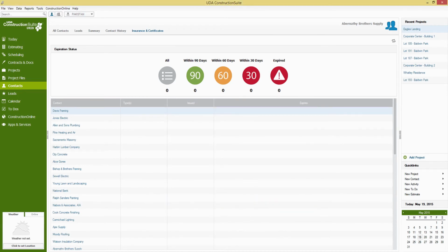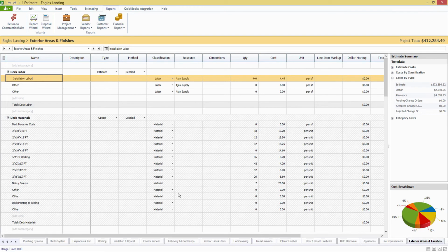All right, so when assigning the subcontractors or vendors in the estimate, if I click the first line, like I showed you before, and this would be the same for the markup or a number of other places within the estimating, it automatically prompts me to apply it to the full subcategory. If you have the typical vendor that you would use on every job, vendor or subcontractor, any kind of resource, you can set that relationship within the estimate template so that you're not having to assign your team every job.